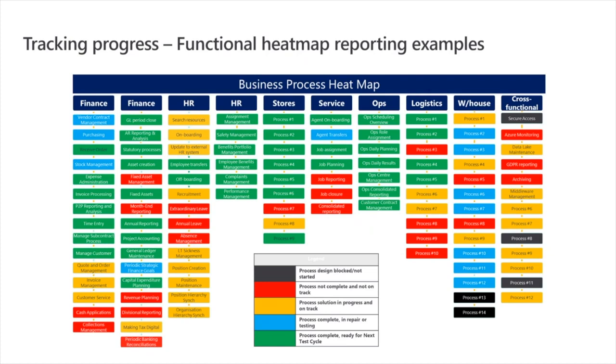project stands. So looking at this, I can easily see, oh, look, I'm blocked on warehouse. I've got 2 blocked things and I've got 5 things that have been in test for a while. Is there a quality issue? Why is it going through repeated test cycles? I've got 2 things that are delayed. I've got 3 things that are not done, but they're telling me they're on track. I ought to pay some attention to the warehousing work stream.